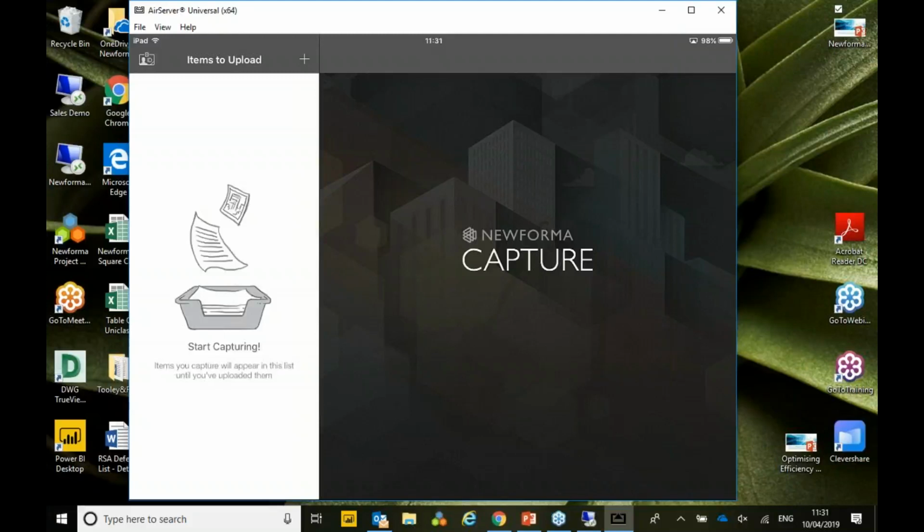So you use the site visits for report function. Absolutely, the immediate report straight from there. And then do you send it out to other members of the project team? We can do. I mean, it depends. You've got to be careful, because it depends what your appointment is. As a quantity surveyor, if I had that hat on, I wouldn't be issuing site reports out, but I would still want to capture all my notes as field notes, because then they will just collate in the same place on the desktop application. But if I'm a project manager, I might want to write a report. So exactly as you said, I might then turn that into a site report from those photos.